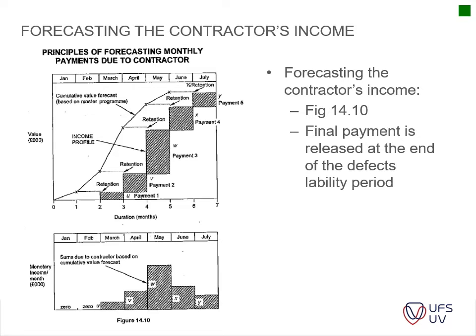Okay, so you've got your value that I've spoken about now. So we've done the value forecast, but now we're getting to a point where your actual cash flow inflow is only received after the first month. So you will see that, like I've explained in the lectures, after here you're appointed, you do your site establishment and ground earthworks and so on. So you already do work in your first month. Your second month, then you put in your first claim. Okay, so for the amount of work that you've done here, you put in your claim.